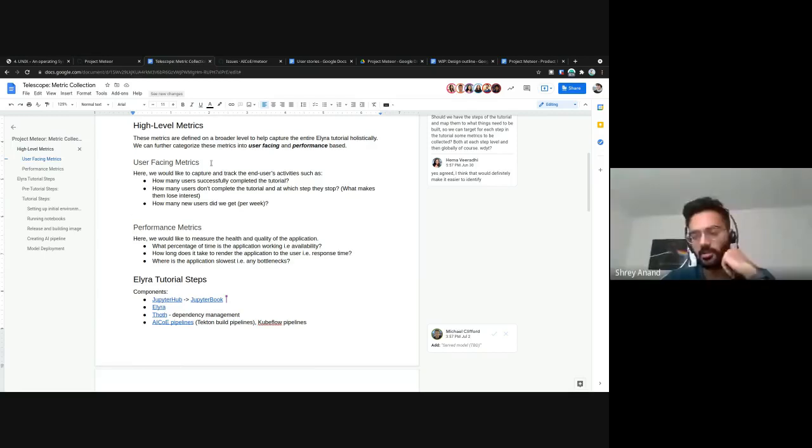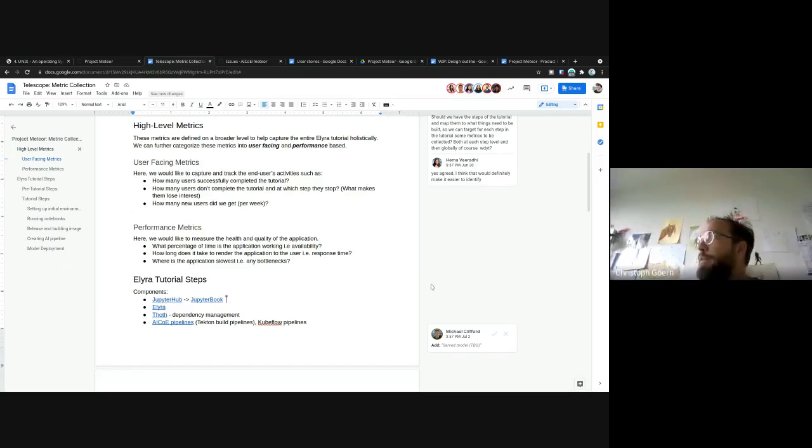What do you mean by persona? I mean the persona. In opposite to user or to person, you have a category of users, like the OpenShift operator who is doing all the storage management. You can associate a number of user stories with that role. It's not really a role, but it's called a persona.